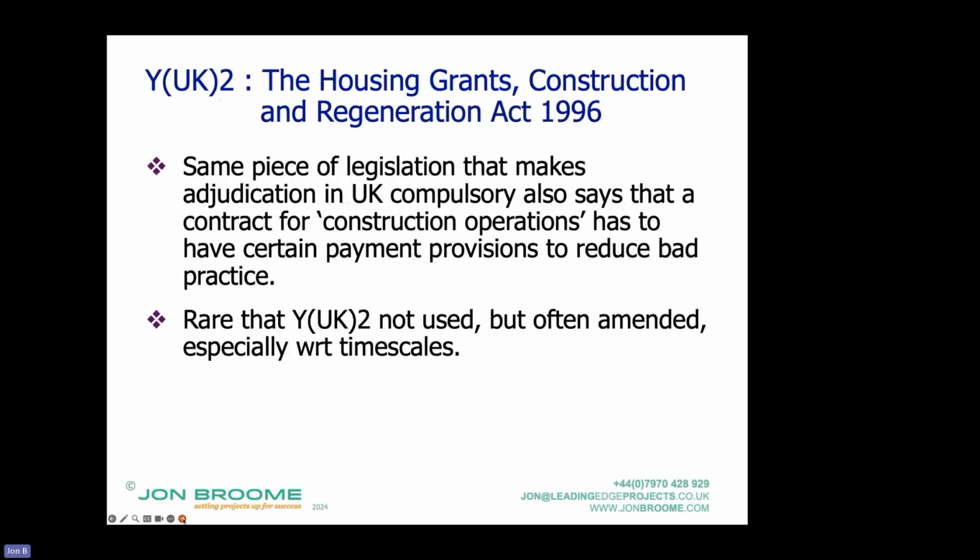The Housing Grants Construction Regeneration Act, the same piece of legislation that makes adjudication in the UK compulsory, also says that a contract for construction operations, and it defines what those construction operations are, has to have certain payment provisions which comply with the Act. If it doesn't, then a thing called the Scheme for Construction Contracts applies, which is fairly badly written from what I gather. In the UK, it's rare that YUK2 is not used. It is often amended to some extent, and especially the timescales are amended.